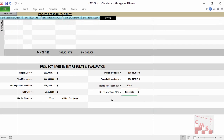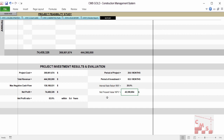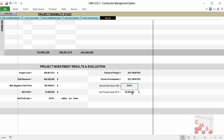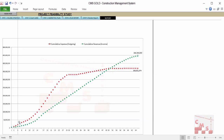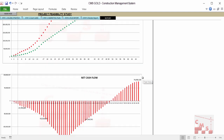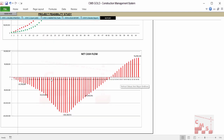CMS then gives the final report with acceptance criteria for project evaluation: the required maximum cash flow, the net profit, the internal rate of return (IRR), and the net present value (NPV) — because $1,000 today is not equal to $1,000 after five years. CMS considers this and gives the final evaluation, plus a diagram showing the relationship between cumulative expenses and cumulative revenue during the project life cycle, and the net cash flow required for your project every month.